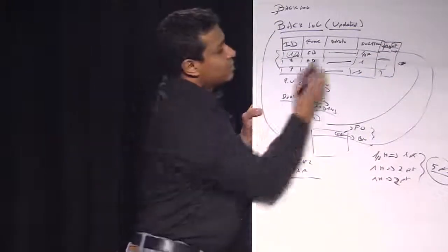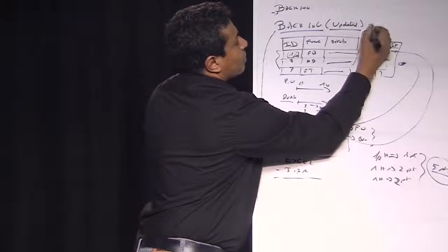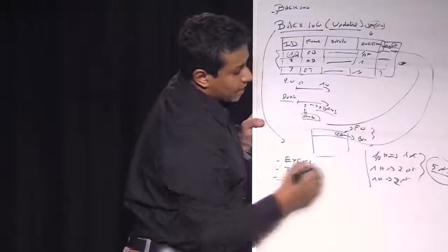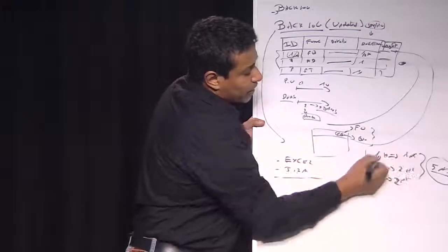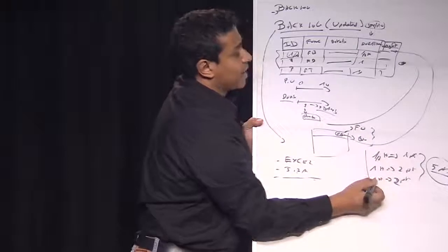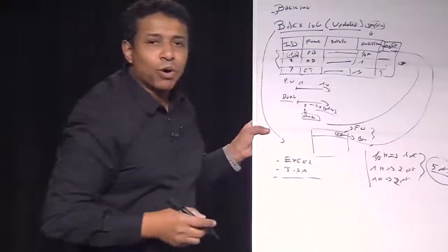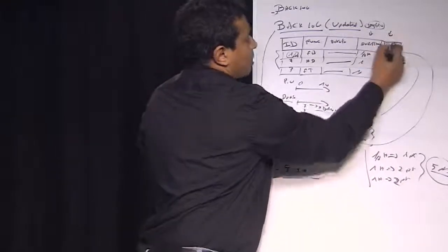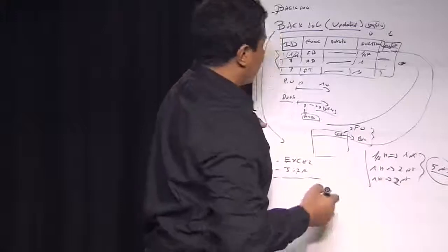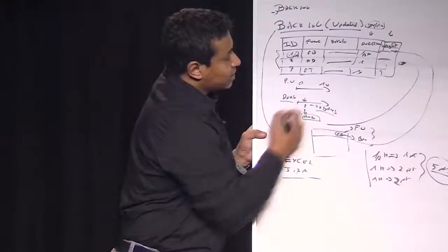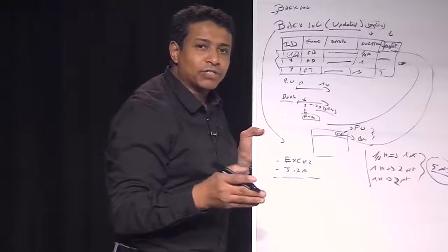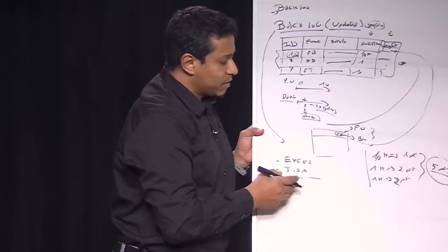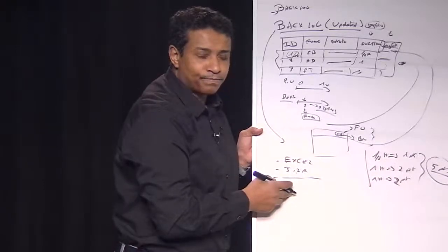And this weight will be decided here by the SM and the PO with this rule. Does half an hour cost a point? Does half an hour cost 2 points, and stuff like that. And we're going to see that this is more important than you think. Because if this is regularly updated, I will be able to tell if it's possible to do the sprint on time, as fast and as easy as I'm talking to you. This is the beginning of calculating and estimating how a project can be done in the right way.